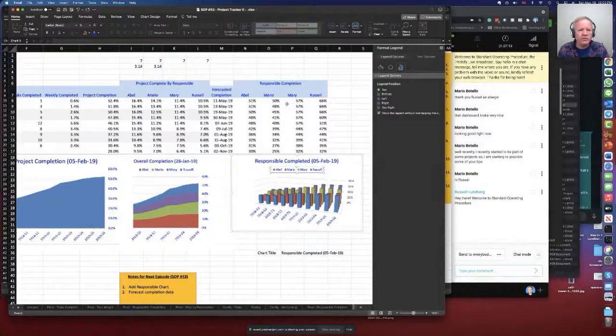I should say, this isn't really project management. I always call this project tracking, because project management depends on the order and the sequence, and there are dependencies and precedents. That's really project management. Whereas this, we're just tracking. But often that's enough, for a lot of site-related work, like just a checklist, or preparing for a vendor firmware upgrade, or maybe you're adding a second carrier, or something relatively simple that is just a bunch of boxes to tick.